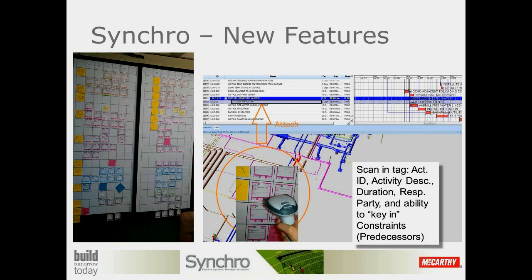So we're updating the P3 location-based scheduling, and all of our full scheduling is happening on a weekly cycle. Everything gets reported out on a weekly basis. Otherwise, it's too much, and by the time you get to the end of the month, you're lost in the woods. You have to do it on a weekly basis, otherwise you get lost. So the 70,000 activities, I think, is through the 5 projects.